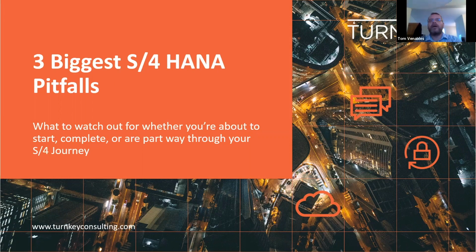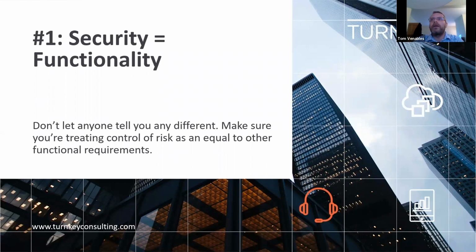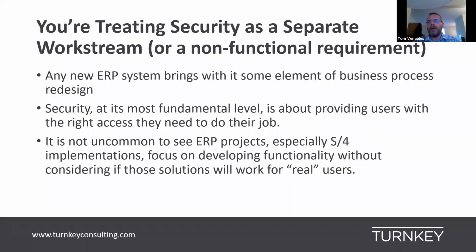And the first thing to watch out for is to understand that security is an equal to functionality. I've seen projects that try and treat security as a non-functional requirement, or even describe it exactly as a non-functional requirement. And therefore it gets treated as a separate work stream, often with less priority, less resources, and less attention from the project team. That's quite a dangerous route to take, because security requirements will often impact designs and testing, and you don't want to expose those late in the program.